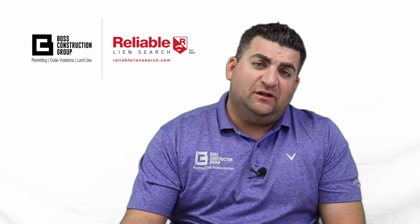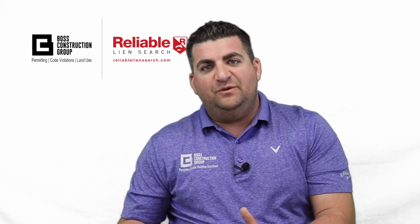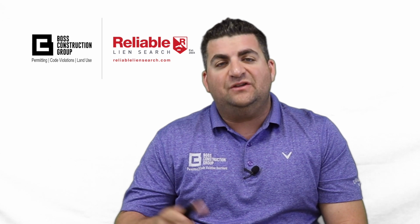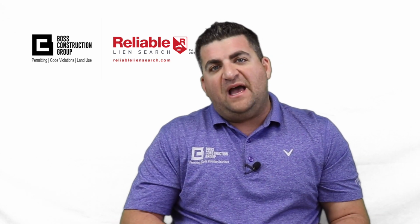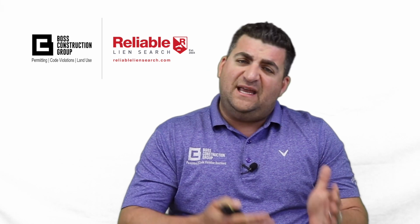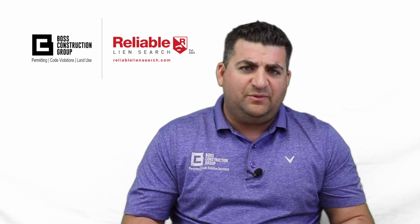We were able to close this out so the estate could sell the house and everybody could move forward. But keep in mind, the buyer wanted this closed out. That was very important to getting the transaction done, which we were able to help out with. Some of these matters we can help out with in a matter of administrative closeout in 3 to 7 business days. Some of them take 10. Again, like I said, every situation is different.